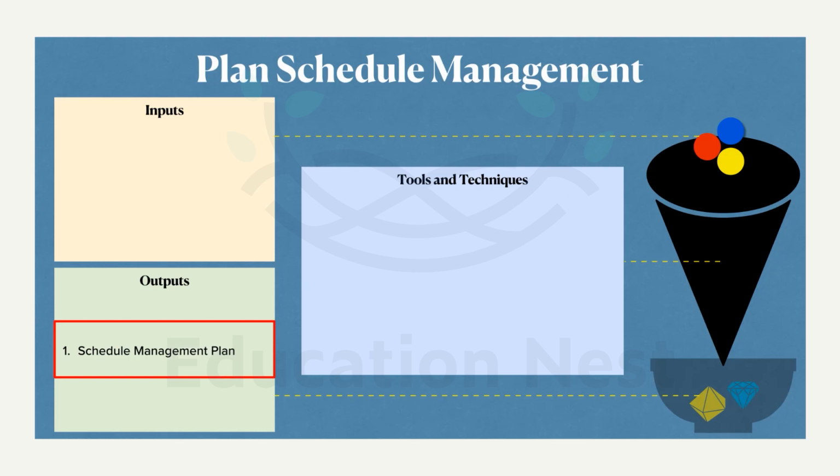So those are the agile methods. We can either choose the project to go in that traditional critical path method, or we can choose whether the project will go in the agile method. Of course, we need prior permission from the project sponsor and all the other stakeholders for this, but that is decided in this schedule management plan. We will also understand the length of the total iteration. Will it be 3 weeks? Will it be 4 weeks? Will it be 5 weeks? If at all we choose agile method.